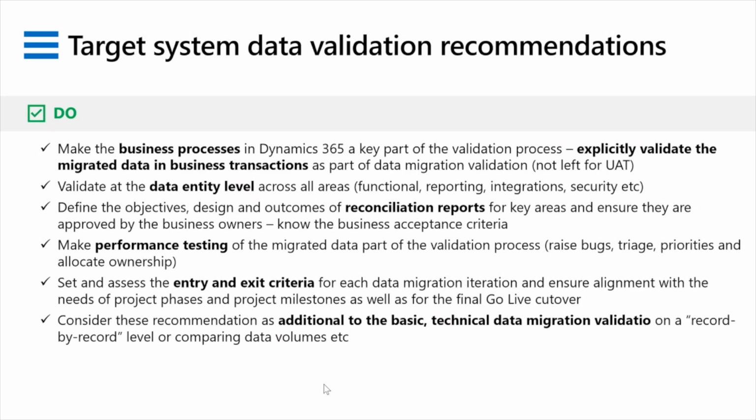And strictly speaking, often that is the remit that's given to the data migration team or the cutover team. The reality is that it's in your interest to make sure that validation is stretched out to make sure that data is usable in business transactions in the target system, because that's the real meaning of that data having arrived correctly. It is no good saying that I have 500 records in source, I have 500 records in target. If it's not usable, nobody wins, right?